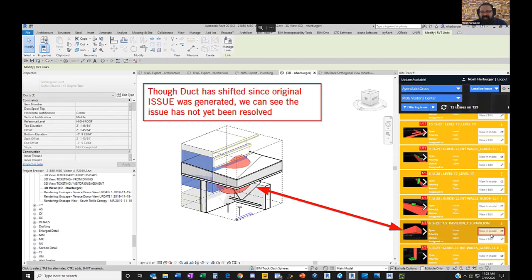A lot of the issues just keep getting resolved. And we can put timelines on, and say, some of these things are really simple, I want them resolved in a week. And if there are things that require additional attention, you can edit and add notes and have a conversation that gets tracked through BIM Track as well. That sort of conversation about elements, and the communication gets built in through that interface.